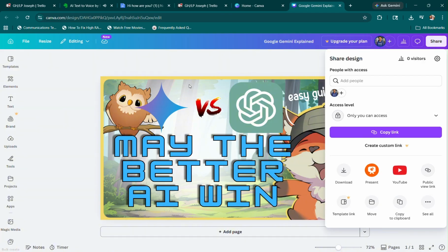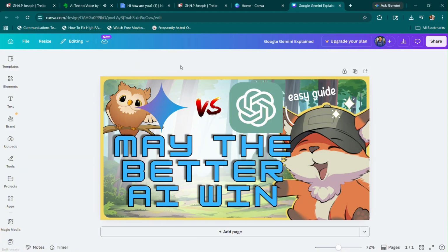This creates a clean review loop. The card says what needs to be made, the asset gets made in Canva, the link goes back into the card, the card moves to review, and once it is approved, it moves to done. Nothing gets lost, and the approval process is visible to everyone involved.